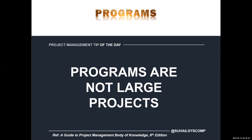Regarding the project manager: the project manager should be involved as early as possible — even when the project is being conceived. If that is not possible, at the latest, the project manager should be involved before project planning starts, since he is the person responsible for planning. There is another role in organizations called the business analyst. Business analysts and project managers work very closely and their roles somewhat overlap throughout the life of the project. The business analyst is part of the organization, not specifically the project.